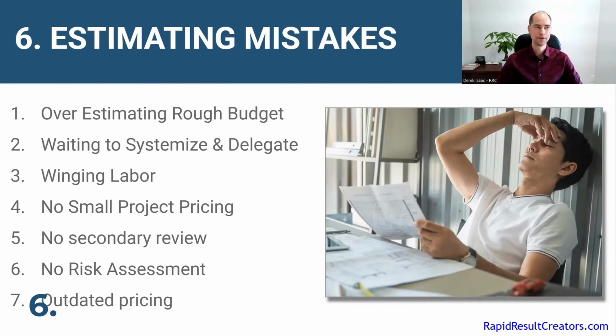And then finally, outdated pricing, especially on larger projects or home builds. If you've got a lengthy process of design and then planning and permitting, and they may not be able to start right away, the pricing that you give them now will be different from a year from now when maybe they're ready to move ahead with their project, or 6 months or what have you. And if you're basing your pricing on the project you did last year and now you're projecting ahead the pricing, in 6 months or 1 year from now when they start the build, that's going to be vastly different, and you could be out 10-15% depending on fluctuations in price.